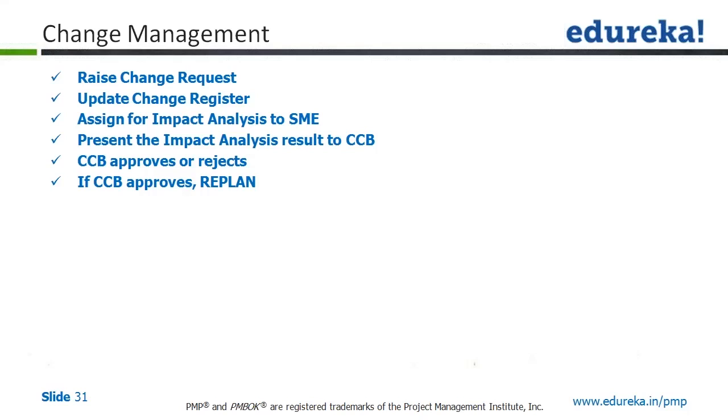So remember one thing, before you go to the change control board, it is expected that you have considered all the possible options to look at why the change is needed and why you cannot manage without the change. So you have considered all the pros and cons very clearly before you put those changes back to the management and the change control board. The change control board has the right either to approve or to reject a change.